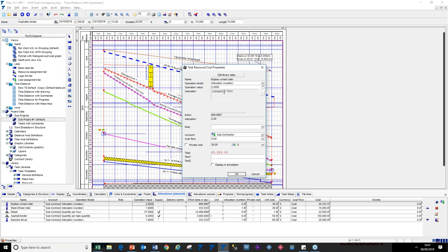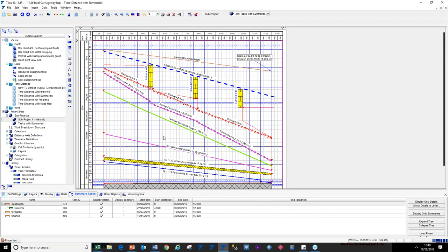And of course, as the length would change in the plan or the quantity, then the number of resources required could be driven by that. So that's often about when you're hauling material over a distance, the efficiency of which that can happen can be incorporated in that calculation of the amount of material, for example.